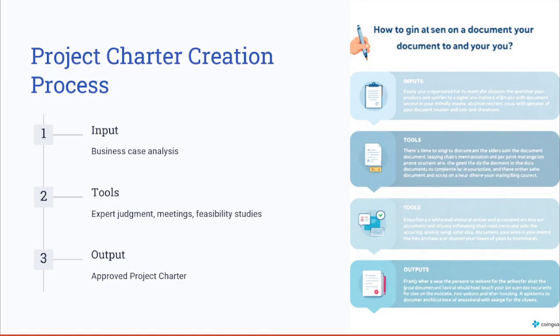Now let's talk about the project charter and its creation process. The project charter, as one of the key deliverables of the initiating group, is developed by analyzing the business case and its objectives. This process involves consulting experts or conducting feasibility studies and hosting meetings with the stakeholders, for example, to refine the goals of the project. Once it's finalized, the project charter serves as the guiding document for project initiation and planning.